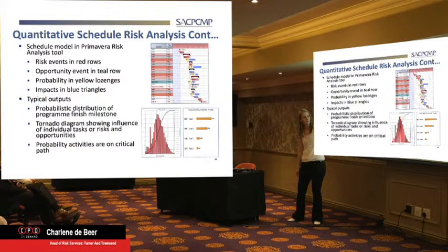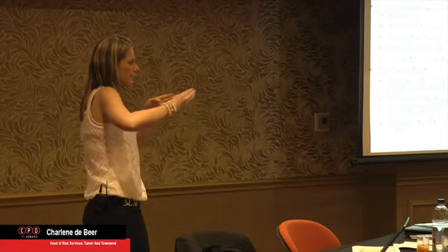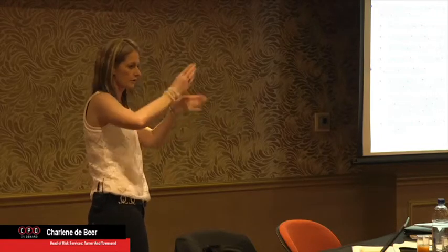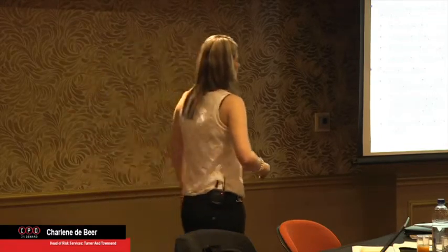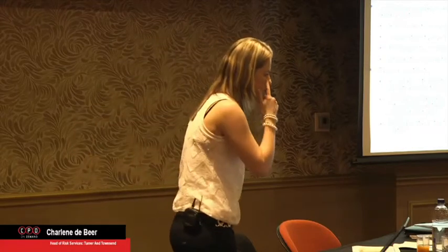And you don't only link them to critical, like there's a little purple one, there might be a milestone that we want to attach it to. And then of course the likelihood is the blue one saying it will move it out by that much. Now, schedule has logic in it, which means if there's no float on an activity, and I link a risk to it, it will literally overrun that activity by that much. And if there's a knock on to another one, it will knock that one on. If there's no link, so last activity within that area, it will just overrun it with a few days. There will be no knock on. So it's got a lot of logic. It's just how do we link it as well.